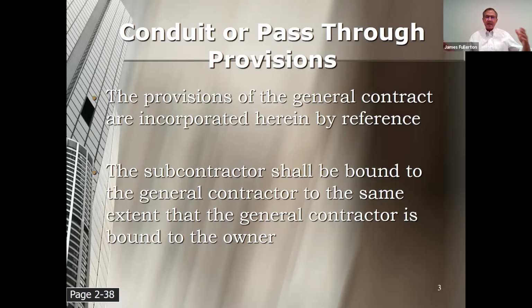If the only document people have passed back and forth is your proposal, most judges will decide that was the agreement, that was the contract. But what I'm leading up to is that if they send you a subcontract, as they often will, you want to say right in the scope of work of that subcontract, the provisions of our proposal or bid dated such and such a date are incorporated herein by reference.